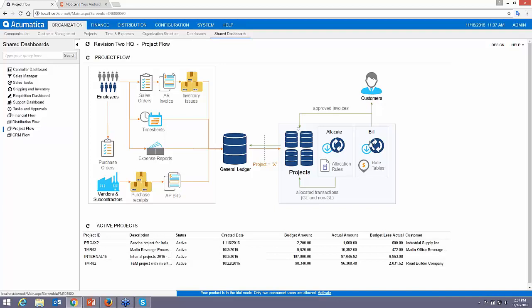The next optional step is billing. Now, once again, I said you could run internal projects, so if you're running an internal project, you obviously don't need to bill it. But billing can take all of the information that you've allocated, and it can bill based on a fixed rate, based on a percentage of completion, or based on certain milestone billing that you will have. What we're going to try and work through today is an example project that will show you how to take a few of these different scenarios into effect all at once.